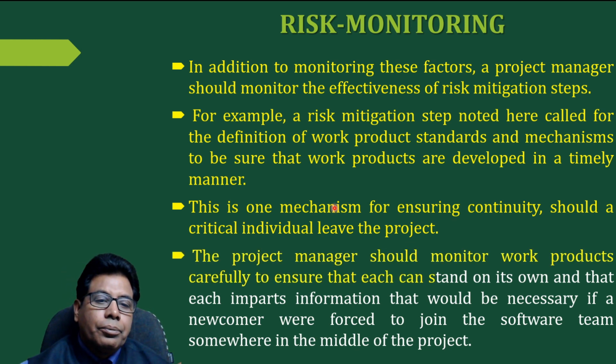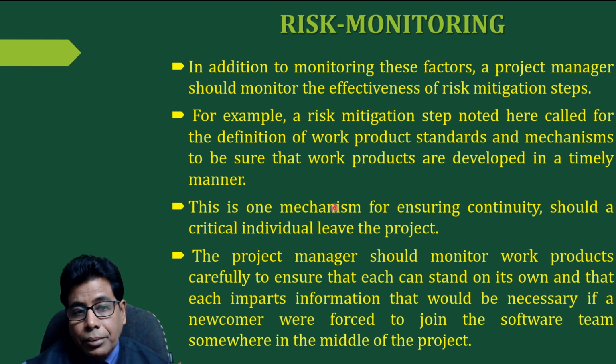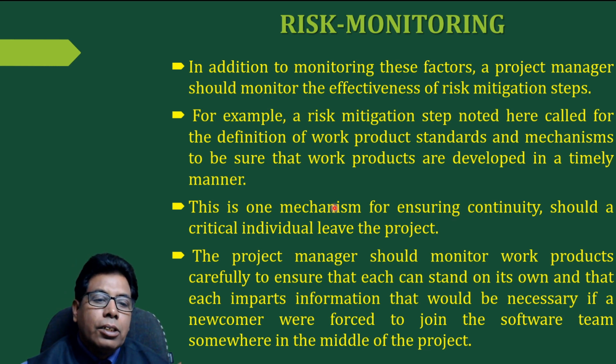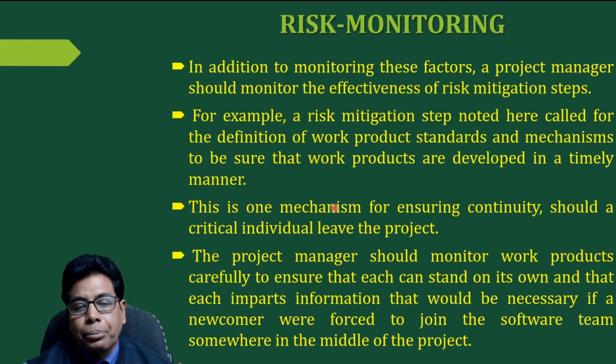And the project manager should monitor work products carefully to ensure that each can stand on its own and that each imparts information that would be necessary if a newcomer was forced to join the software team in the middle of the project. So the documentation, the work product is important, and if it is documented properly, then it is easy to hand over to the new member who is joining in the middle of the project. Then he can proceed with the project.